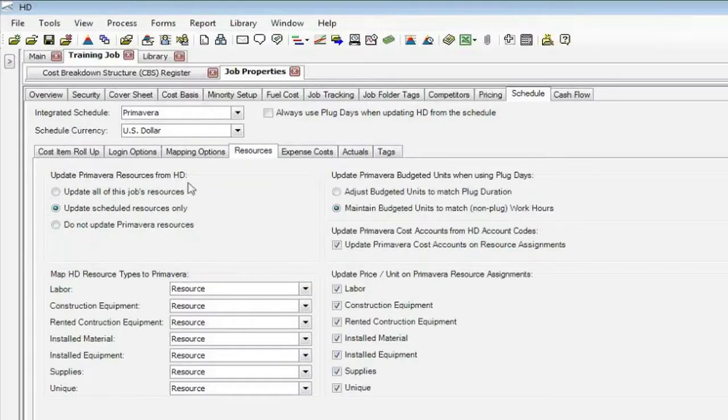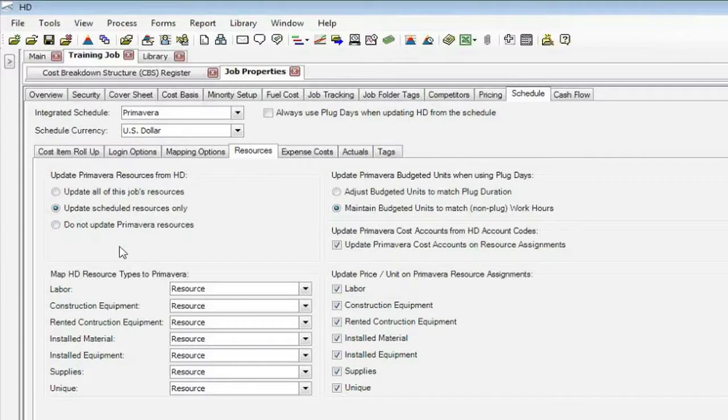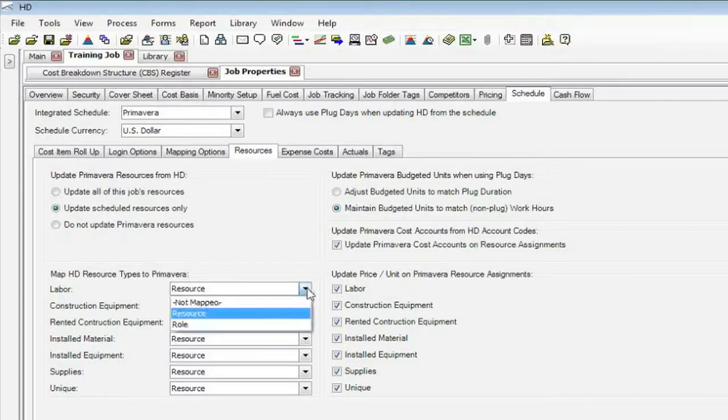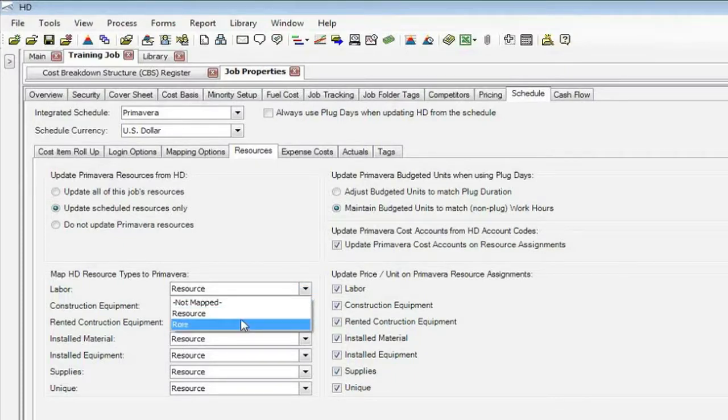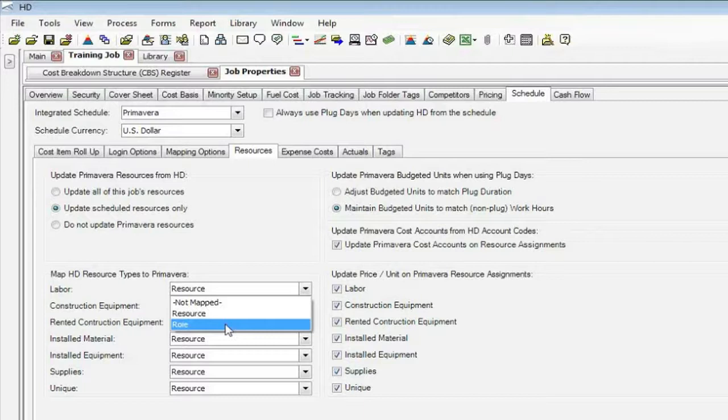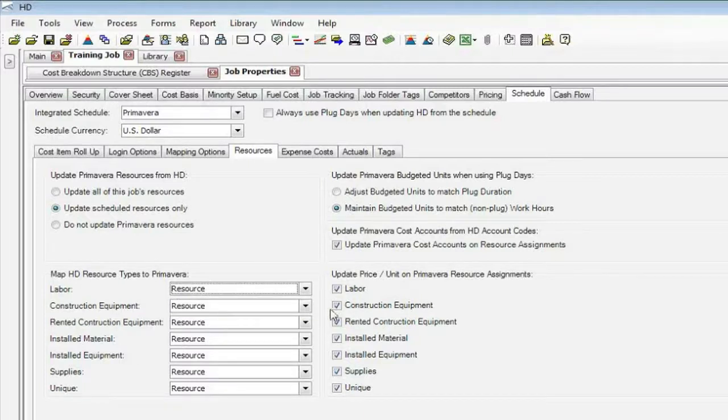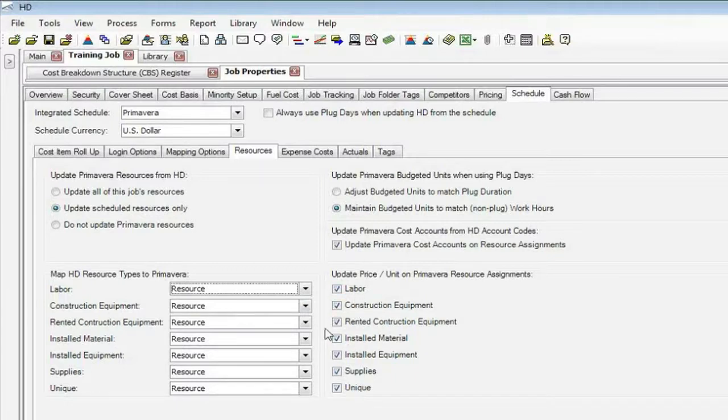We'll send resources out. So we'll set up the resources from Hard Dollar into Primavera's database. You can send resources as roles or resource. So for your labor, equipment, or rented, you may have used a role. So Primavera has the ability to have a role, which is a higher level description of a particular resource. If you want the rates to go over, the actual unit rates of your resources, that's what this is doing.